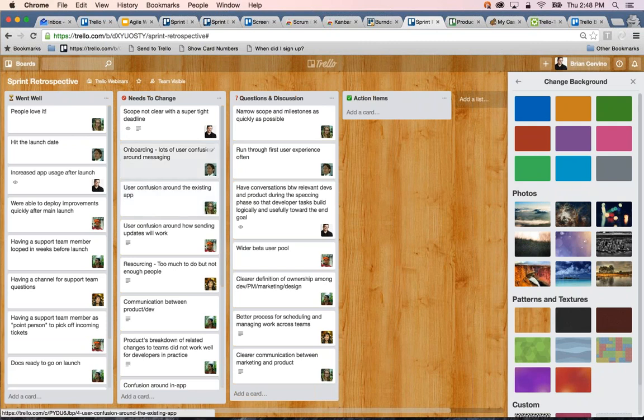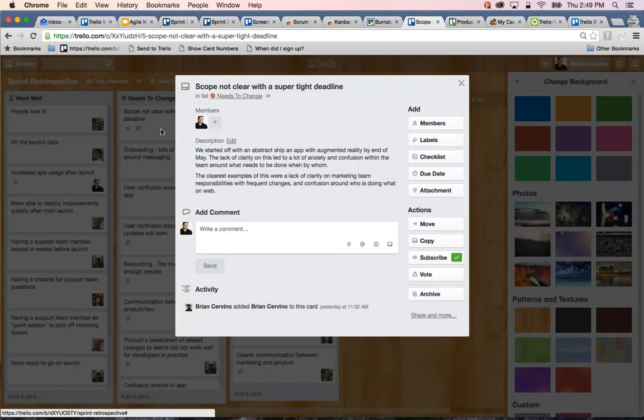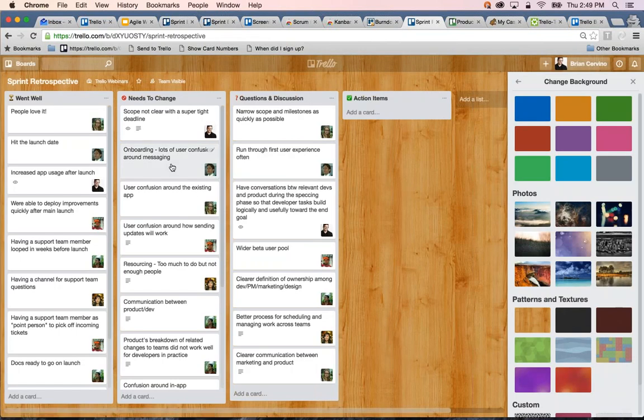Team members should add themselves to cards they've added to the retrospective board so that the meeting facilitator can go through each list and let the person that created the card read their card themselves. After a set amount of time, typically 3 to 5 minutes, the meeting facilitator can ask if anyone needs any more time. If not, the team should go through each card on each list, and cards are read aloud by the person that created the card. Anyone else on the team is encouraged to ask questions or request clarification. You can also add more information to a description here in the card, if the card title doesn't sum it all up.